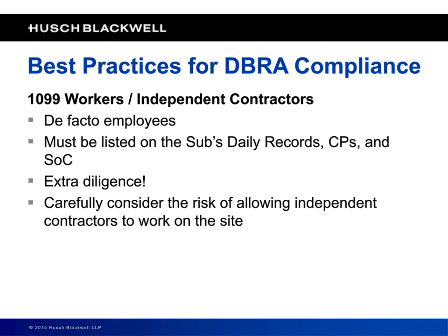According to the Department of Labor, independent contractors are considered employees of a subcontractor for which they work. So anybody who says that they're an independent contractor, whoever they work for, that's considered to be their employer. And that employer has responsibility to make sure that they are paid Davis-Bacon Act wages for the hours that they work on your project site.